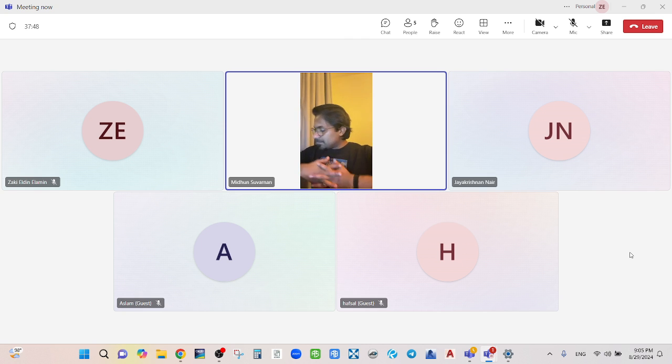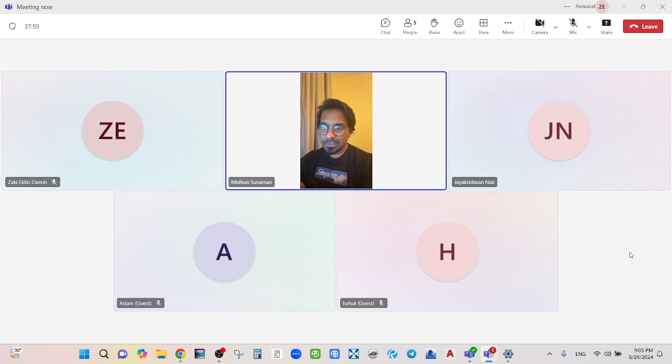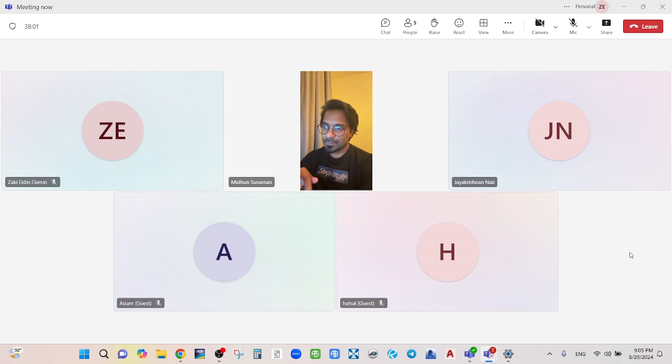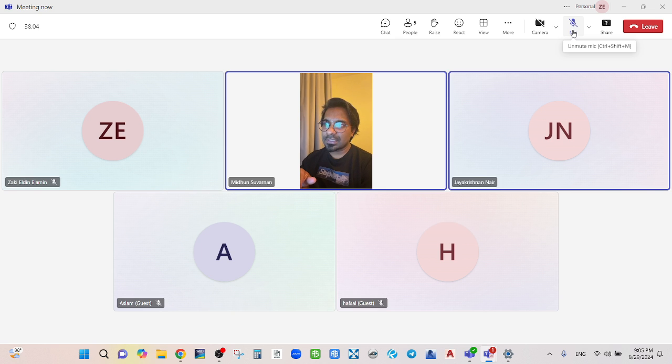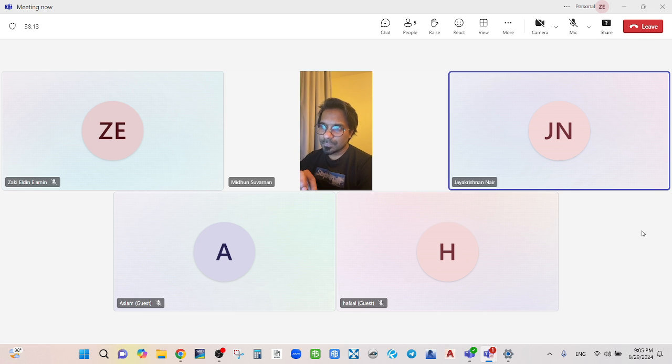Sir, this performance guarantee, what will be the timeline for the contractor to submit it as per FIDIC or any other? Within 28 days, I believe, if I'm not wrong. After signing the contract, right? After signing the LOA, yes, LOA. Okay, thank you, sir.